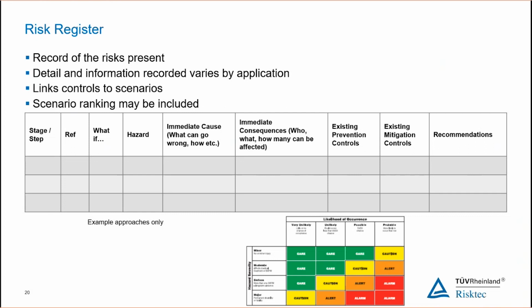And again, as I mentioned, particularly with regards to these control areas, we need to make sure that we consider how they might fail, what weaknesses might exist within those. We can use a risk assessment matrix looking at the likelihood and the severity. That may help to focus, may help to prioritize our appreciation of the risks, may help to prioritize our remedial actions to put in place.